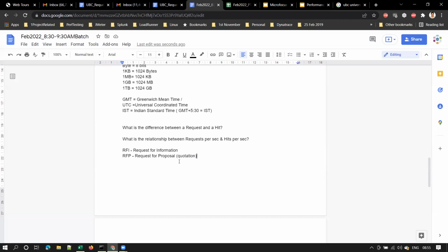They will take the requirements and prepare a proposal document or solution document saying that for your project to be completed, let's say for example, we need to deploy one project manager, one team lead, one senior test engineer, and two junior resources, or two test engineers.